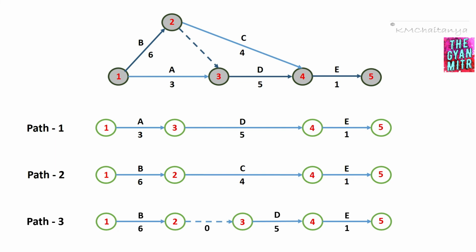Please note that the duration of the dummy activity, which is represented by a dotted line, will always be 0. So that is the definition of a dummy activity, an activity which neither consumes any time nor any resource.